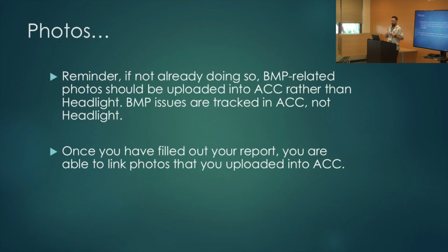Also, just reminding you that with these BMP report forms, you also have to upload your photos, right? So you would have the deficiency photo, and then you would also have the corrective action photo, which is typically being generated by the contractor, right? You're giving them the deficiency, and then they're coming in with the corrective action photo and asking you to close the BMP deficiency. So when you go to submit your report, you should be attaching all of the photos, both photos, right?